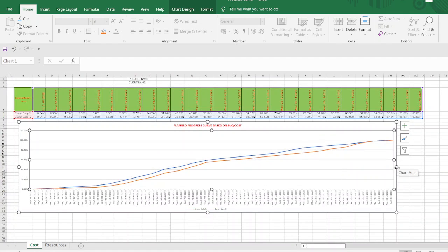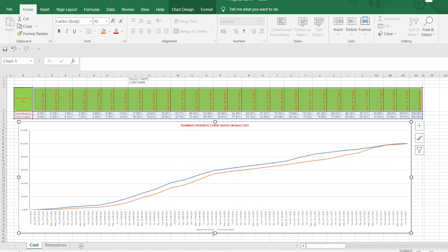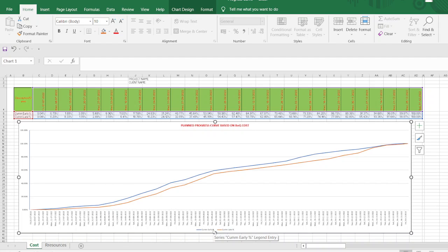Prepared now. You can just make it adjust as per your requirements. This is weekly progress curve. So it looks like something like congested because it is weekly basis. So if you are going for monthly basis, it is not that much congested. So this is our progress late and early values based on the BOQ cost.